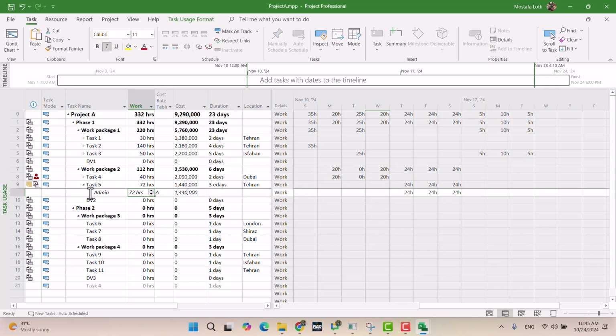But now, by that lag that I set here, I managed to move basically waiting time. I added a waiting time of 6 hours, so task 5 starts at the beginning of the next day, 12 a.m., and starts at midnight, and runs for 3 days. Okay, what is next?